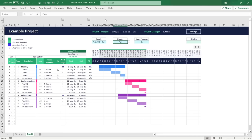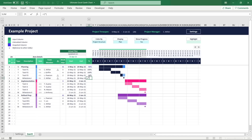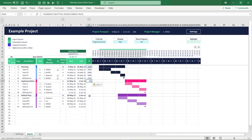This template also allows you to keep track of stage, task, and milestone completion. Once you set 'show progress' to yes, the percentage completed is beautifully visualized as a filled bar for stages and tasks, and as a finish flag symbol for completed milestones. You can even make milestone completion conditionally based on one or multiple tasks, so the milestone is automatically completed only after the linked task reaches 100%. A standardized formula also allows you to automatically update the stage progress based on its items.